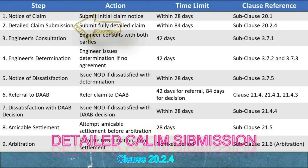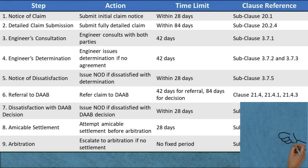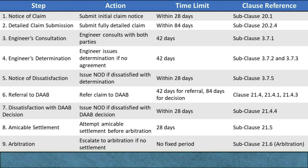Step 2: Submission of the Fully Detailed Claim (Subclause 20.2.4). Action: After issuing the Notice of Claim, the claiming party has an additional period to compile and submit a fully detailed claim. This claim must include a description of the basis of the claim, supporting documentation, records, and calculations that substantiate the amount or time claimed.